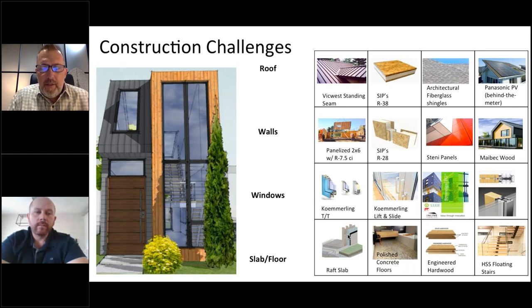Construction challenges, these are a continuation of this discussion. And here we very often get into scenarios where we're a zero setback onto the neighboring properties. If there are garages in place, how do we clad the outside of those walls? How do we ensure that we have, first of all, non-combustible cladding systems to meet life safety requirements in these challenges? And Kent and I use an approach not atypical of a lot of builders today, looking at panelized construction. So for us, we look at mitigating the amount of time it takes to build these. That's not just great for the client, especially clients looking to maybe get these into the rental pool earlier, but it's especially important in terms of your relationship with your neighbors, because in a process that might take 9 to 12 months, a more typical build would certainly strain that relationship.